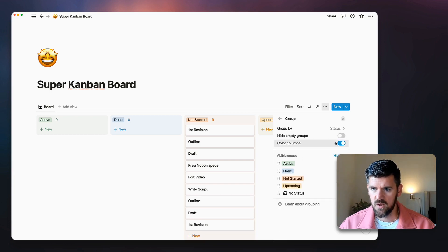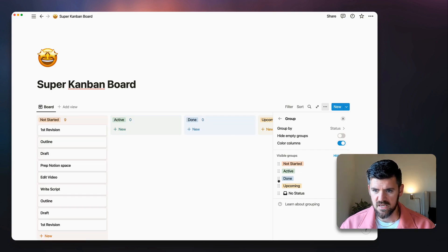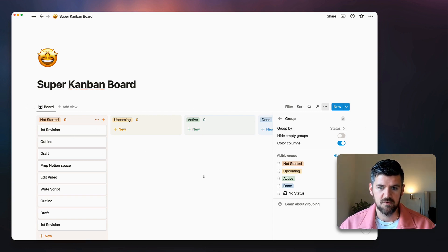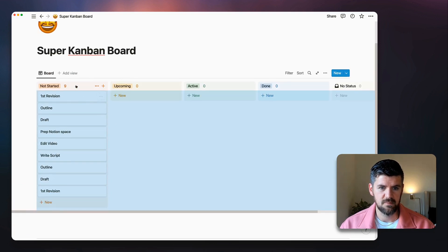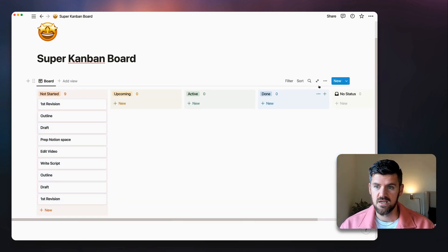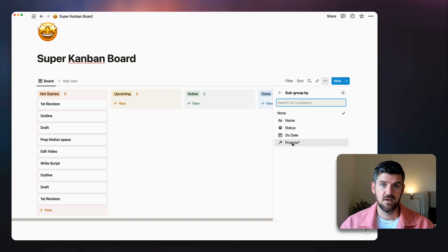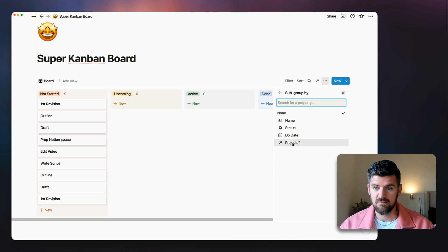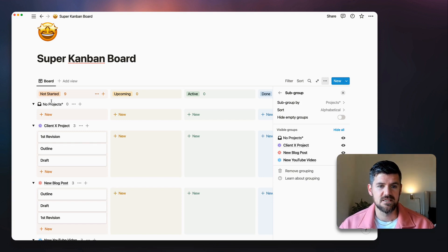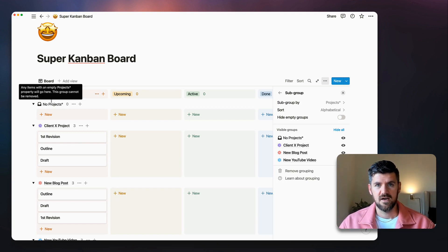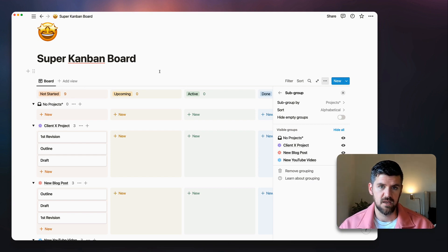In the Group settings, set the order to: Not Started, Upcoming, Active, Done — going left to right. But notice all actions show up for every project without categorization. That's what we want to fix. Going one level further into Subgroup, we now have the option to group by Project because we have that relational database. Selecting Project means we have the board view by status, subgrouped by project.